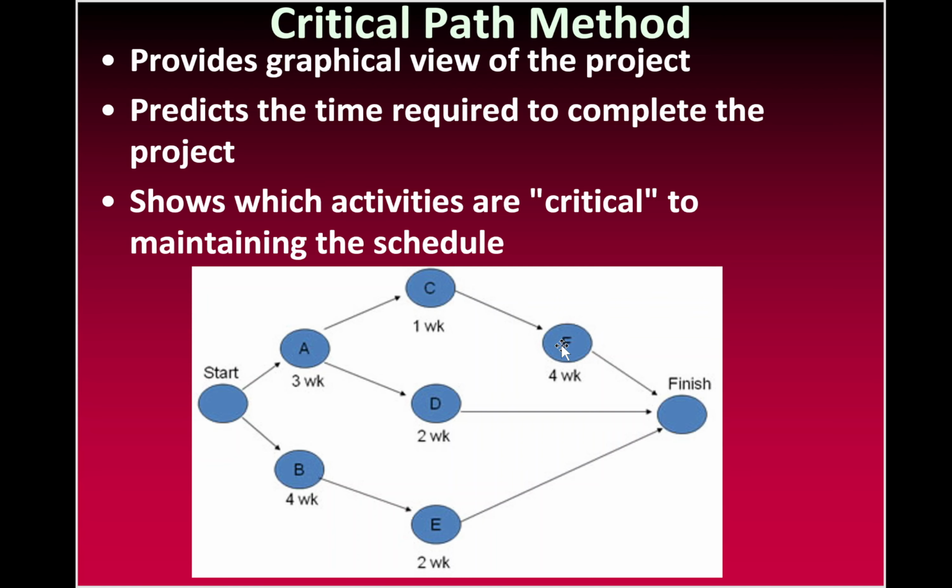Then putting on the roof. But at the same time, you could probably put the roof on while you're skinning the house. So there are certain tasks that can't be done until the previous one is done, but then there are other tasks that can be done in parallel. Once you get the whole thing enclosed, both plumbing and electrical could come in and get to work at the same time. Now, plumbing might take longer than electrical, but the drywallers can't come in until after both of those are complete.